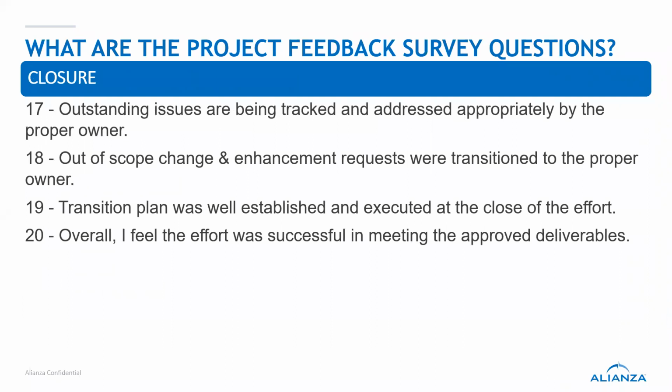Overall, I feel the effort was successful in meeting the approved deliverables, kind of phrasing it in that we talked about stuff, you approved them, did we meet those deliverables? That kind of stuff. Not all questions are equal. That one should hold 80% of the weight. And if somebody says no, then you can't count it. It's the very last question. So it's like you walk them through all this stuff and you're like, was this really successful? Did we really do what we wanted it to accomplish? You're trying to make them say yes three times so they can say yes at the end.